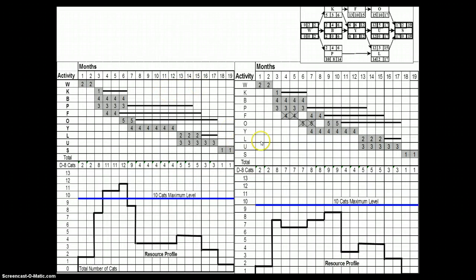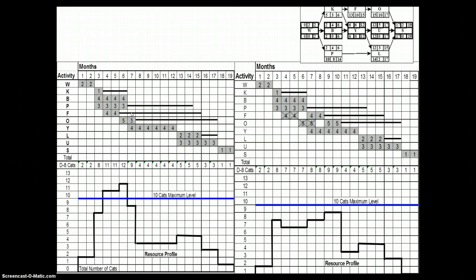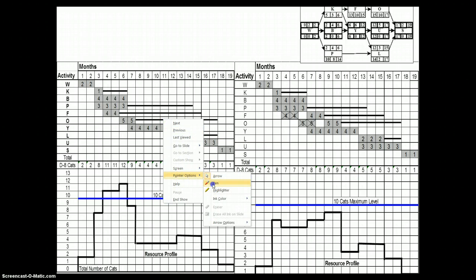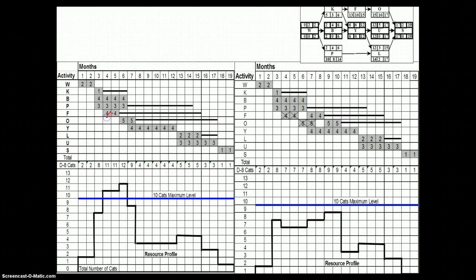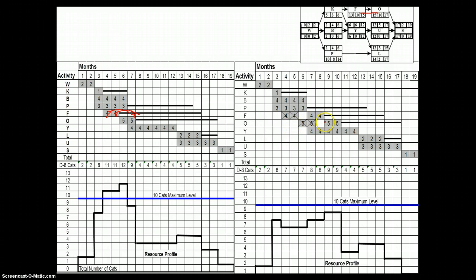We have done the calculations and decided to postpone the start of activity F. Here is the previous resource loaded graph, and you can see we have a very healthy float in front of activity F. We have decided to postpone the start of activity F using this float to minimize the resource requirement. We have moved these resources from here to these new locations, as you can see. You can also see from the logic diagram that activity O follows activity F, so subsequently we have to move activity O to follow activity F.